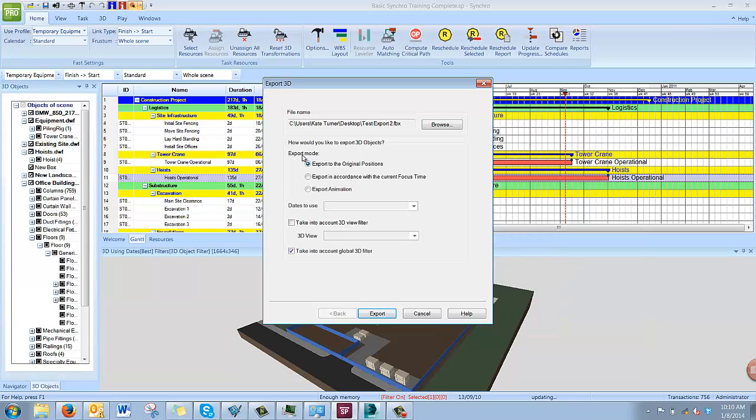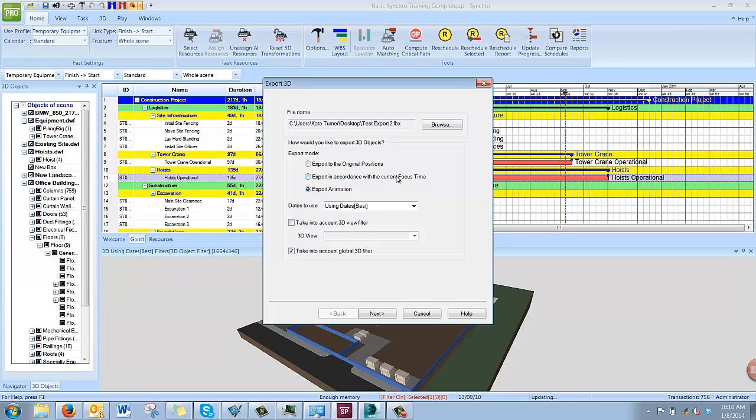In the Export mode, you want to make sure to click Export Animation. The other two options will export static files using the original positions as they were imported into Synchro or with the current focus time as you can see it now, but it would still be a static 3D model. To export the construction sequence following the tasks, you need to click Export Animation.